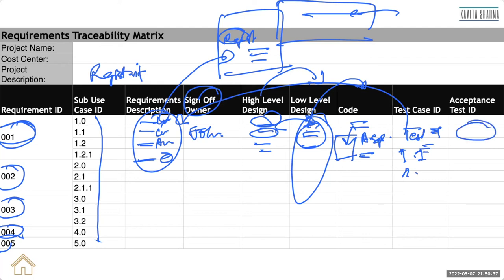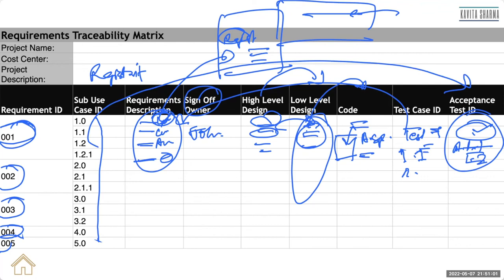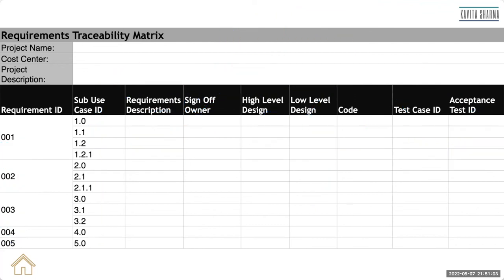And then acceptance test cases are from the customer. So customer is going to say, okay, whether the registration of customer is happening, yes or no, and so on. So each acceptance test case 1.1, 1.2 and so on. So that way, we end up tracing the requirement till the closure, till the acceptance of the requirement.